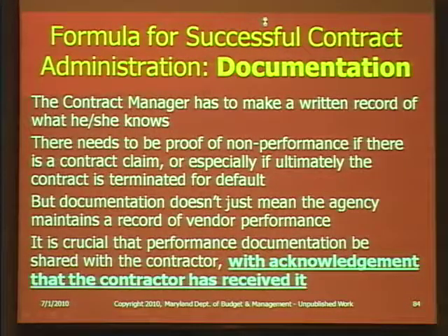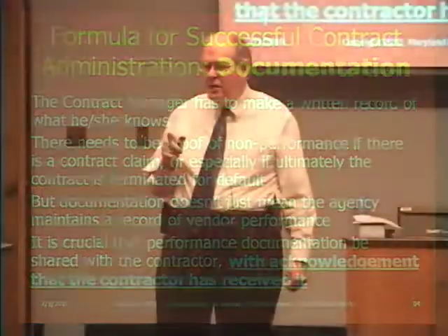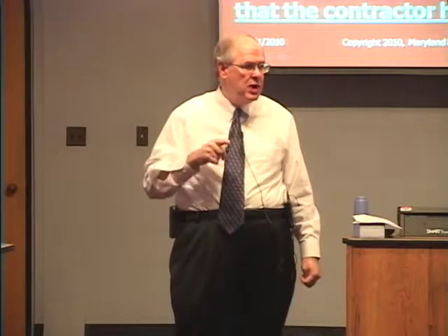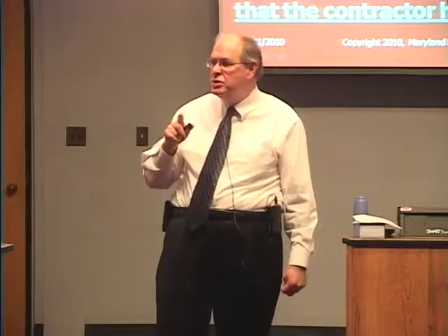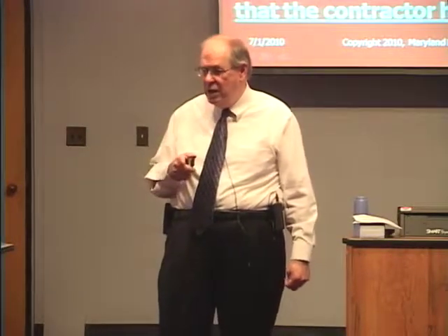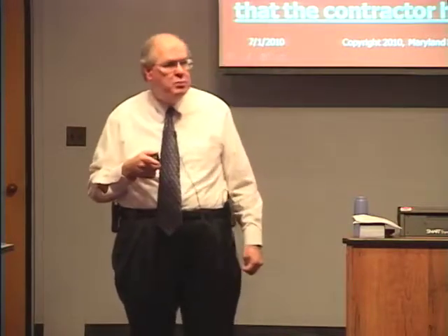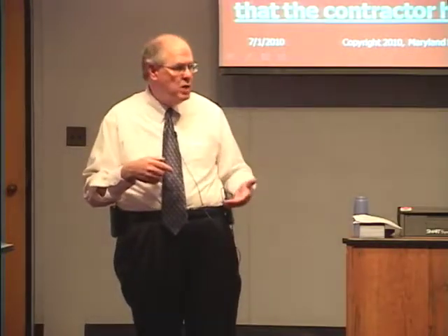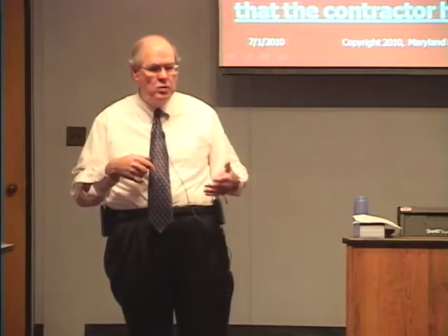The key is it isn't good enough to simply know that something is or isn't happening. You have to document it, because the reality is if you don't document it, it's the same as if you didn't do anything. And I have been before the Board of Contract Appeals on claims from vendors where the vendor wants more money because they say that they're doing something beyond what the contract said, or we've been going after them for money because they haven't been performing.